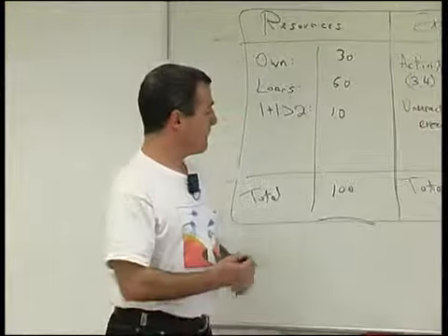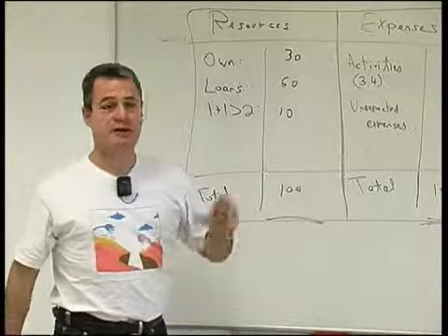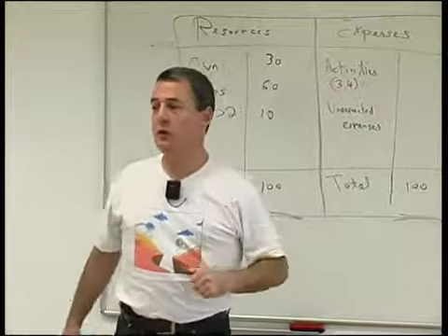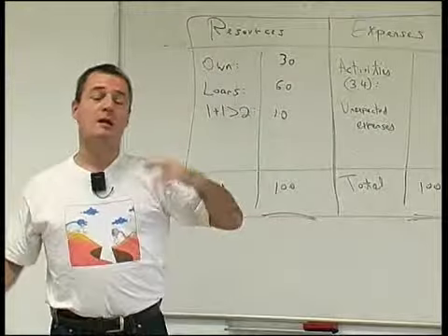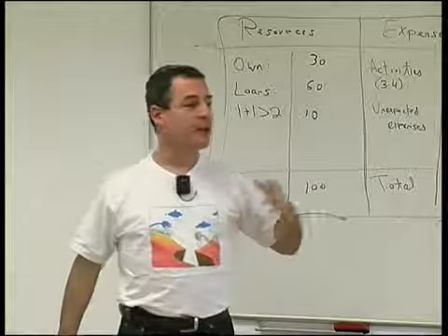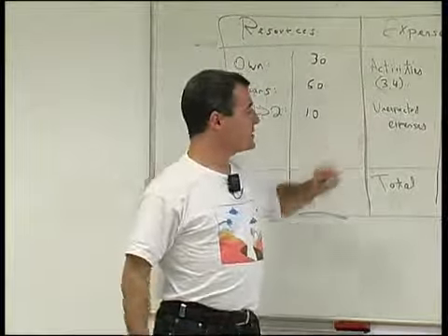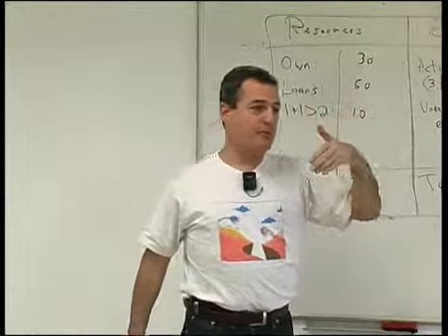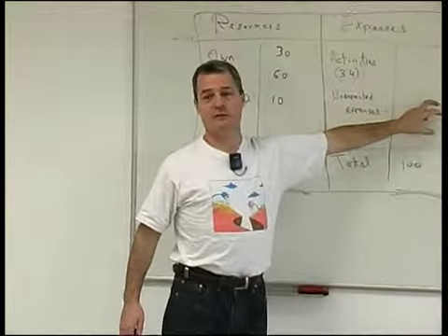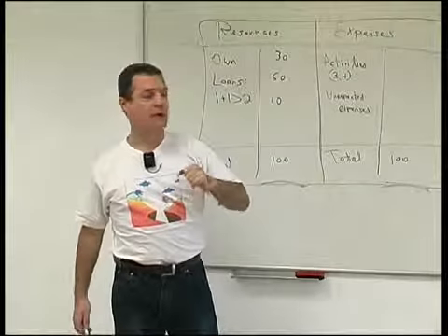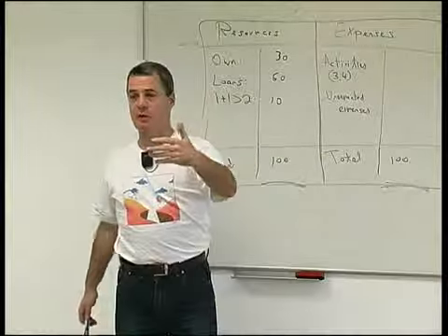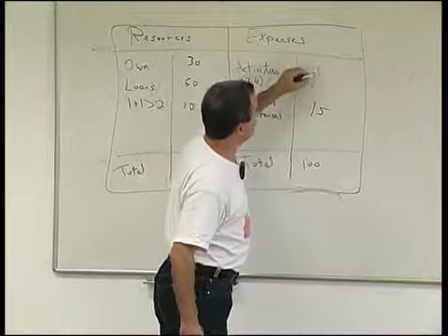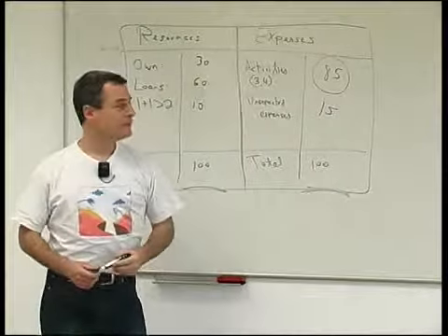On the other hand, I have to understand these unexpected expenses. Not everything you can plan. You cannot plan the full expense in advance. There are many opportunities on the way, but you cannot leave it to that. You cannot say, let's wait and see, let's hope in luck, let's believe this and that. You must allocate a certain amount for unexpected expenses. In a new company, in a startup, in a new venture, this can be a very high percentage because I don't have any history. In your case, we're speaking about companies that exist now for at least a season, a year. We can allocate here 15%. It is enough. The 85%, where does that come from?